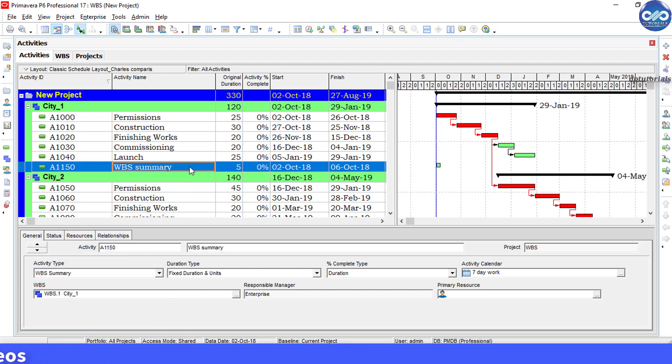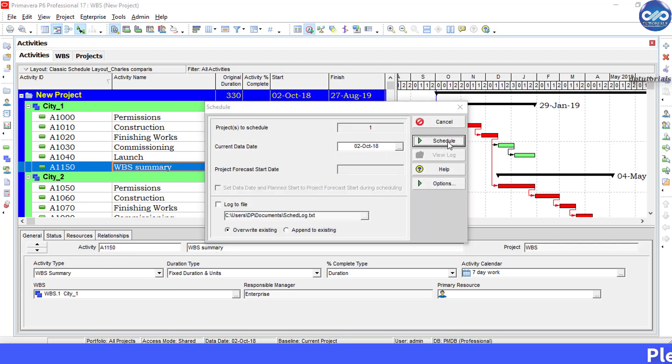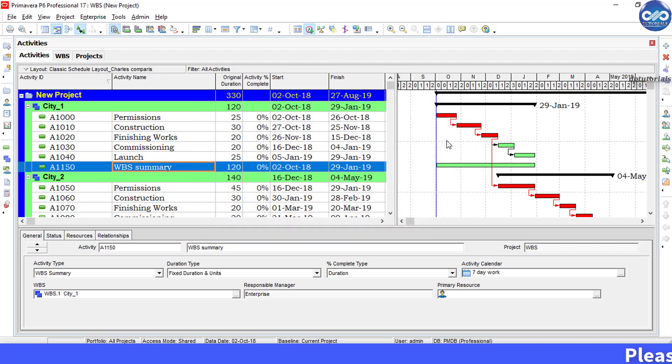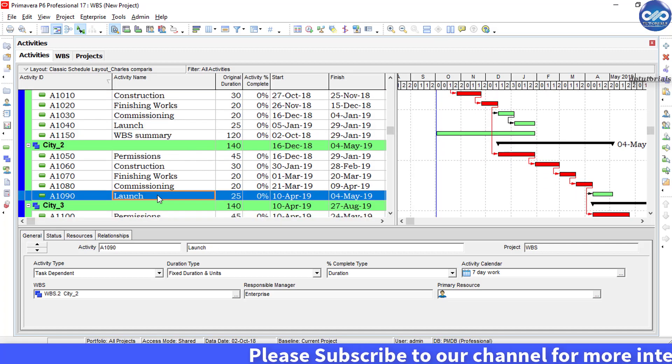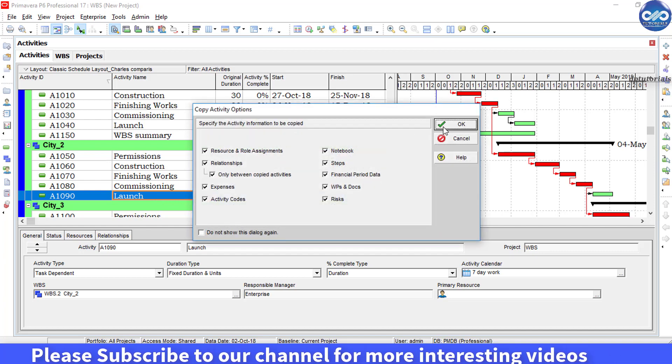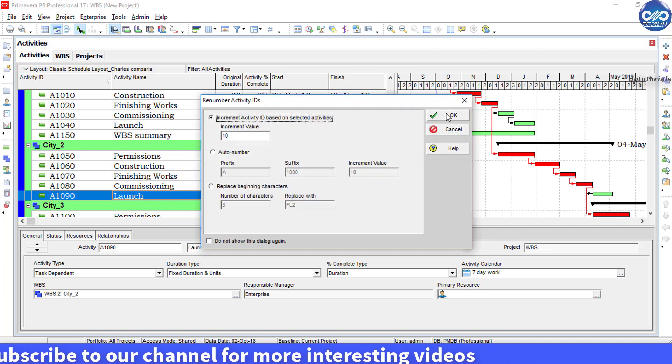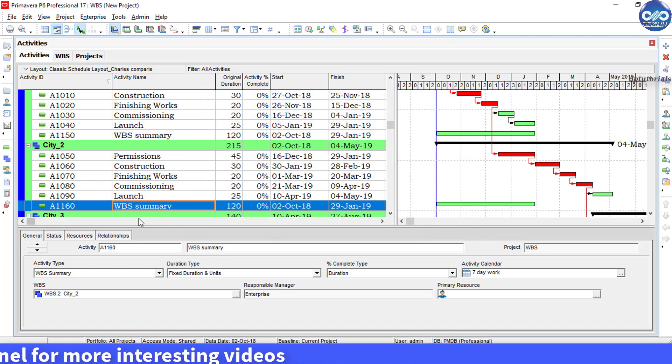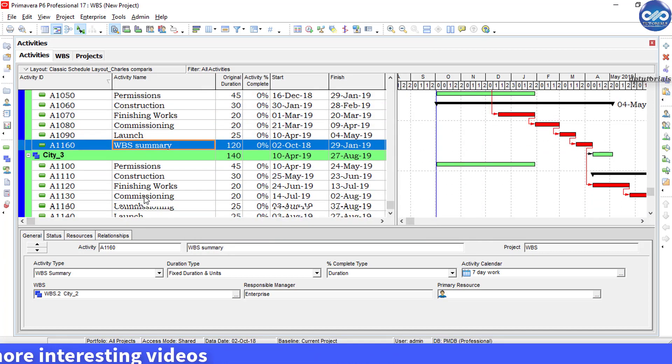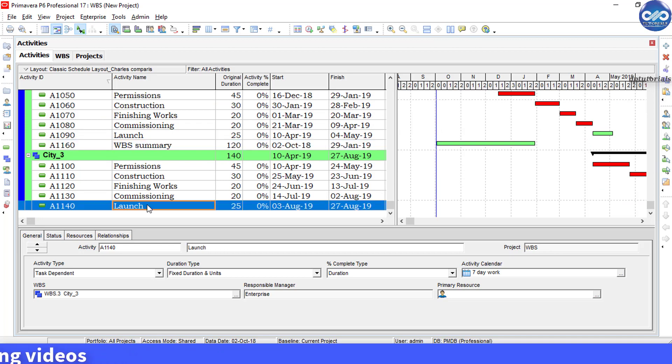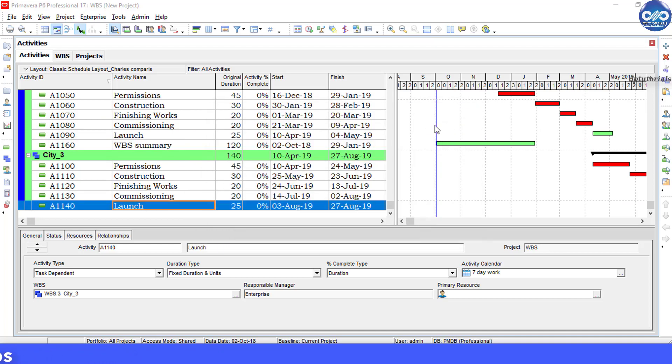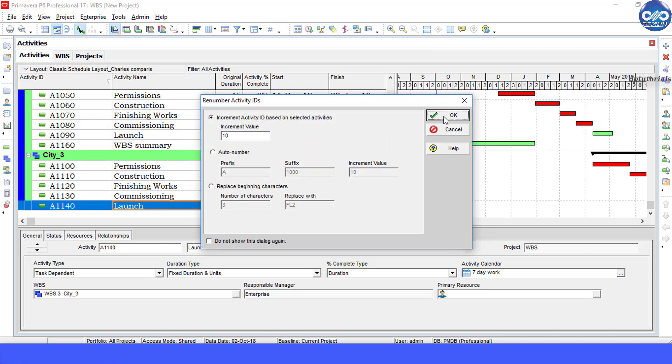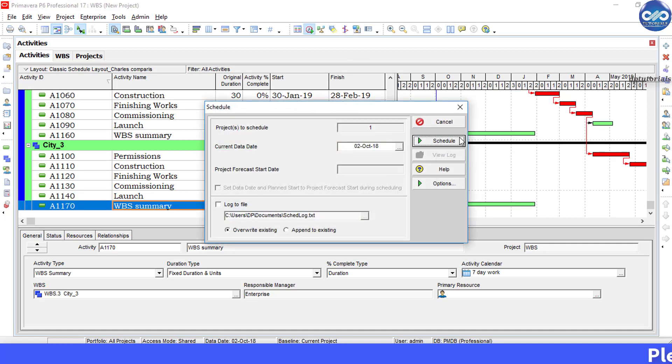See, the WBS summary and this activity called WBS summary will be showing the exact information. Now add the similar WBS summary activities into the other two cities. Now observe, each WBS has an activity which information is exactly matching the WBS summaries.